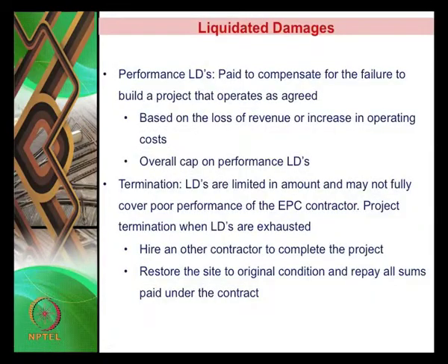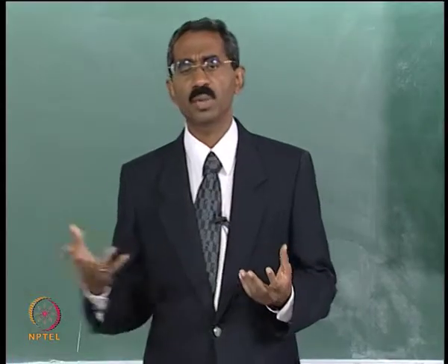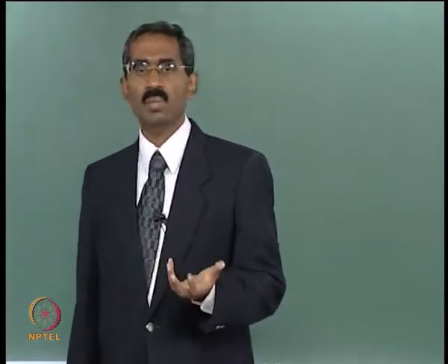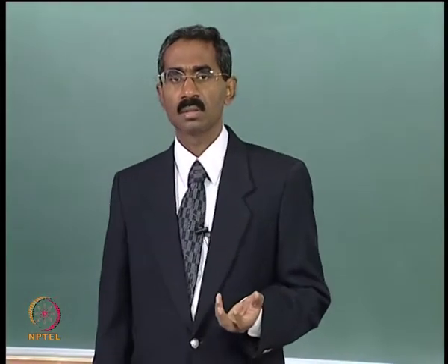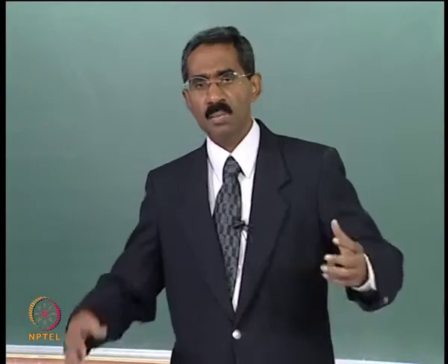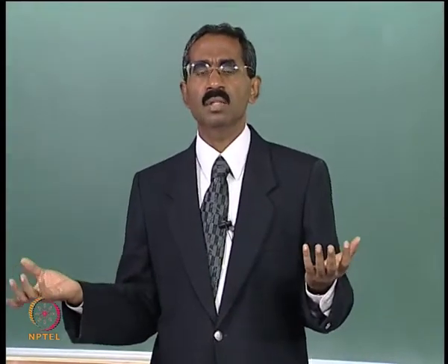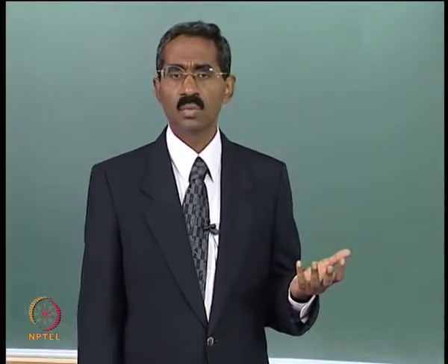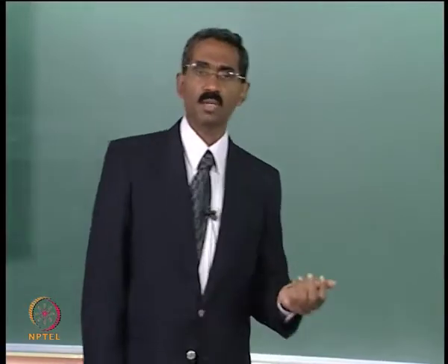Second, in the case of termination, the EPC contractor is expected to restore the site to the original condition that was given to him, and he is also supposed to return all the payments that were received under the contract. Now these are issues that are going to be very difficult to enforce. For example, what happens if the EPC contractor does not have the wherewithal to pay back all the amount received under the contract? And he has done so much development that demolishing all of it and restoring the site to the original condition is going to be very, very costly and wasteful of so much productive investment.